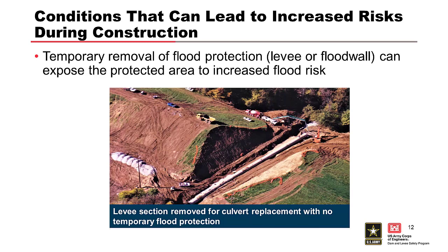Temporary removal of flood protection can expose the protected area to increased flood risk. This photo shows the construction of a replacement levee drainage culvert with no cofferdam in place or other temporary flood protection in place — here is the new conduit being replaced, here is the excavation through the levee, and again, no cofferdam or other protective measures.